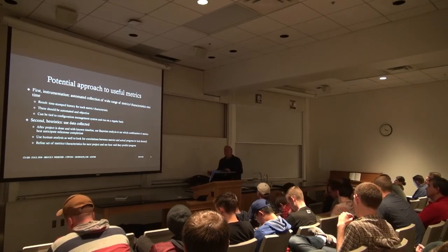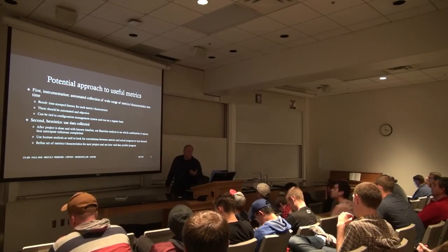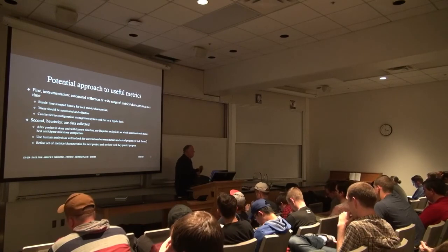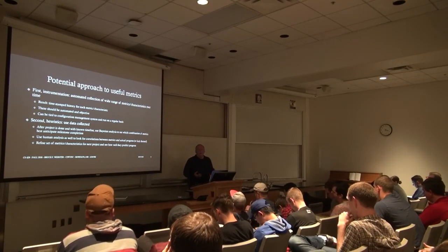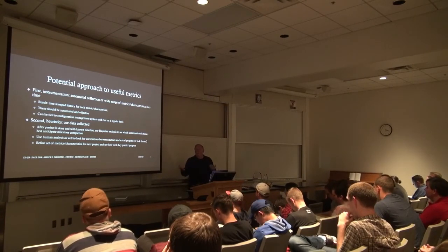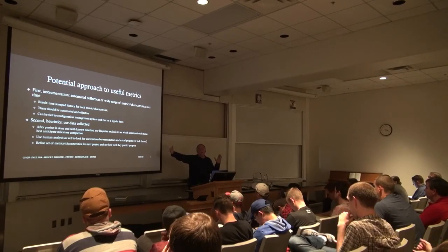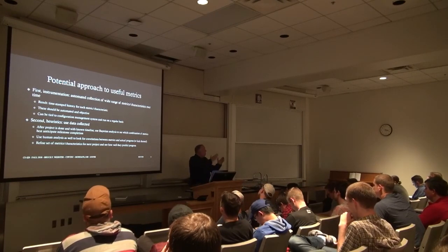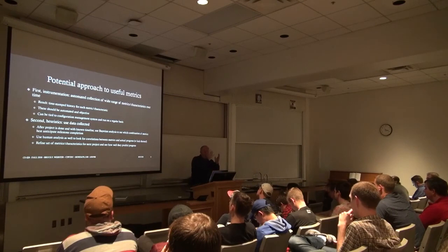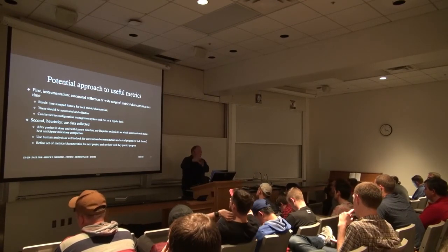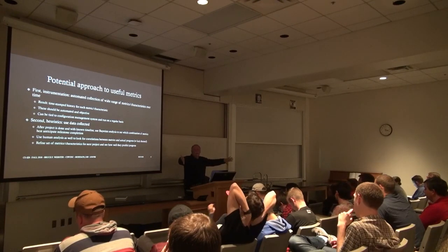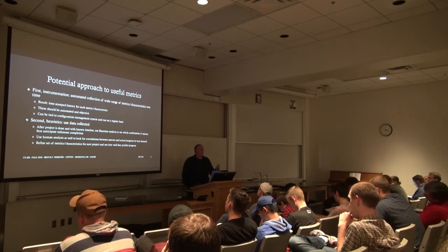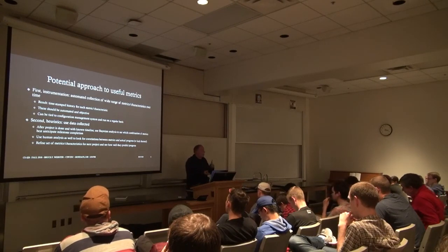So you have those judged, and then typically you have a review process that goes through and says, here are the defects we've prioritized based on both their severity and their critical nature, and we're now going to do that. And what a lot of organizations will do is that really most feature requests are just sort of a form of defect. It's missing this feature. So you basically have severe bug, major bug, minor bug, cosmetic, feature request, a continuum like that. And you typically will have a review process that will determine the priority of what needs to be fixed, either adding new features or fixing defects.